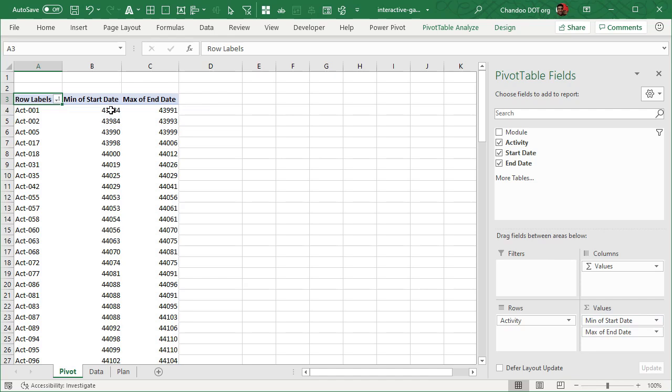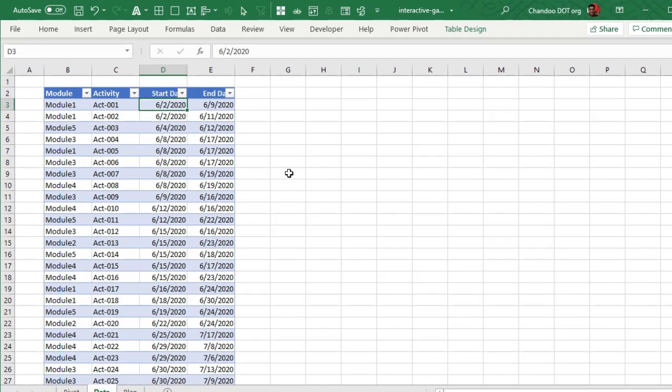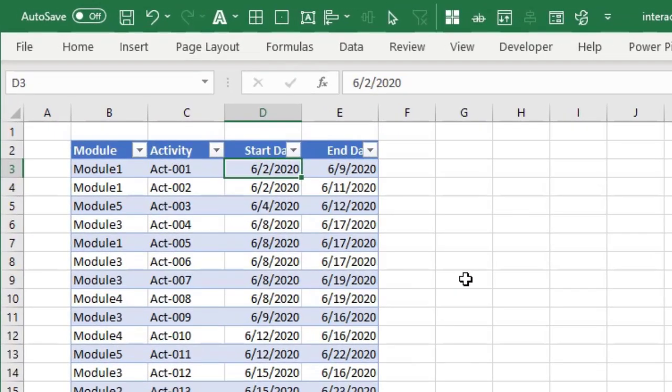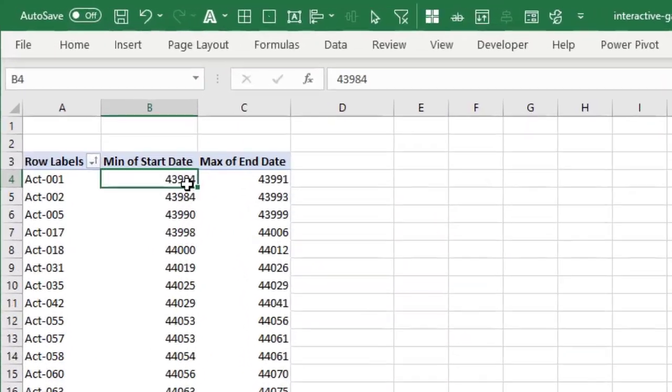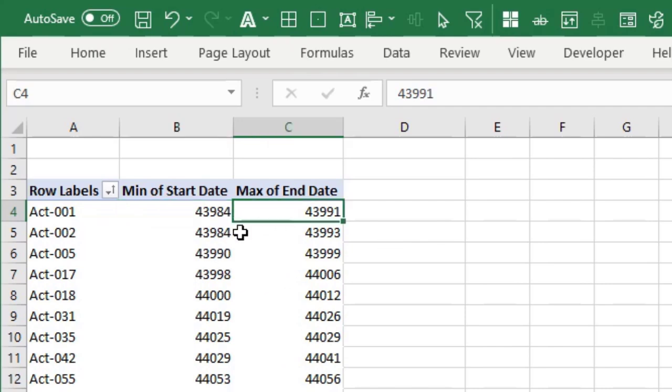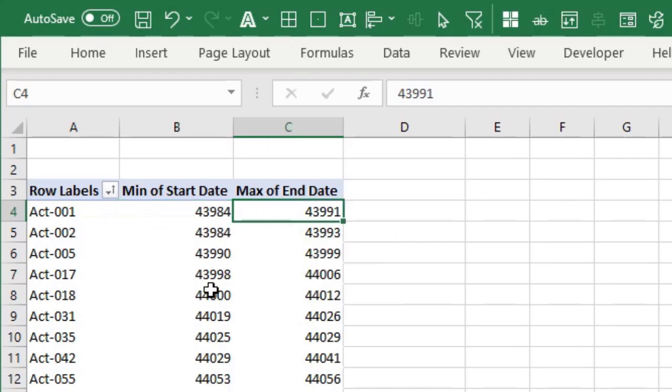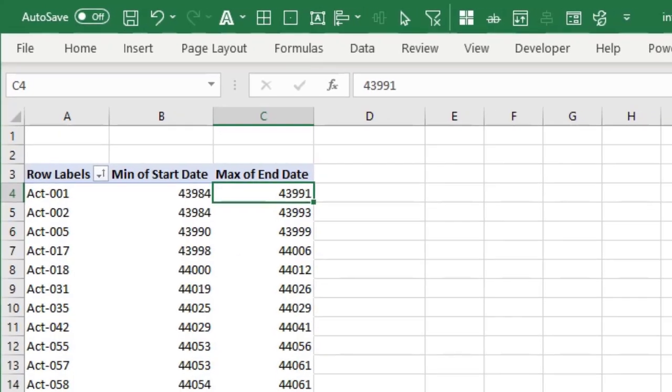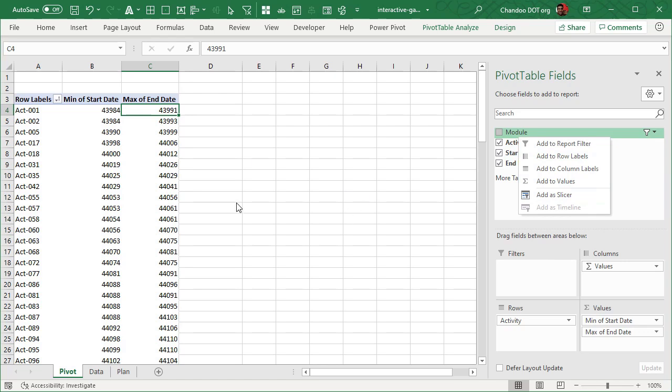But it's best to use min or maximum. That way, there is only one date ever for any activity. And then that's the 43984. If you go to the data, you can see that this is actually supposed to start on 2nd of June 2020. But 43984 is the number representation of that date because Excel dates are stored as numbers. And max of end date, this way you will know when that is finishing. So once that pivot table is set up, you want to add module as a slicer on the pivot table. That way, whenever you pick a module, only the activities for that module are shown.